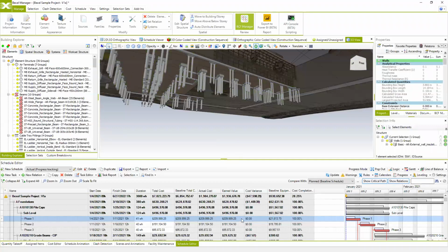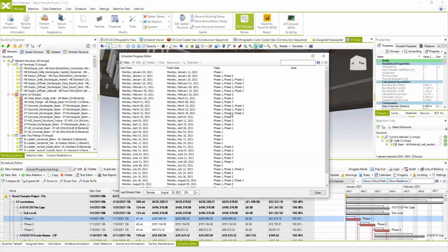And of course, you are not entering all this information regarding resources, specifically the man hours and the quantities of executed works. So we do have some additional help which can be used, but we do not recommend that kind of progress entry. The best workflow is selecting the elements and then entering the progress using the progress entry window.